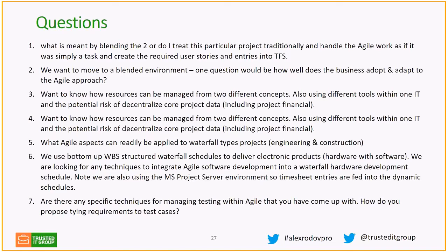Agile. This is purely an Agile question. As you know, there are different Agile flavors, different Agile methodologies, like Kanban, for example. When you work with Kanban and features, you can have the whole life cycle of the feature and stories go through this process of coding and deploying, and then verifying and testing and UAT, and then deploy to production. So you can build this process in place, and you can map out all the features and test cases,